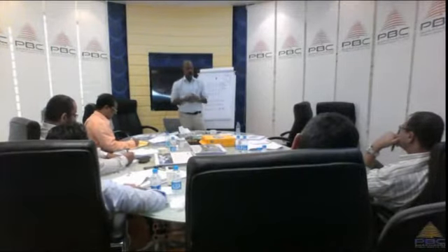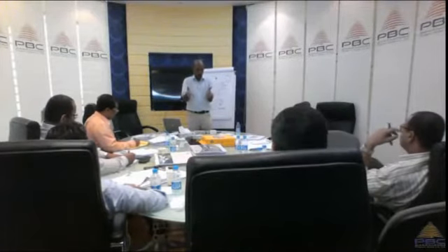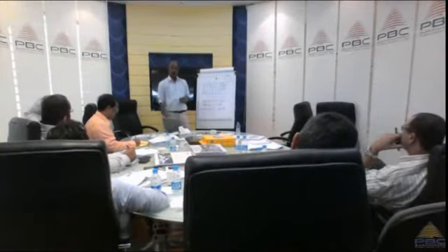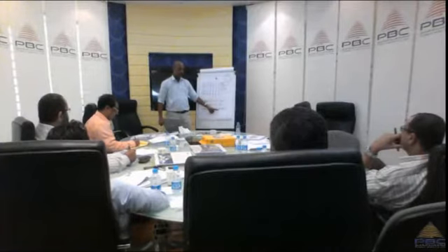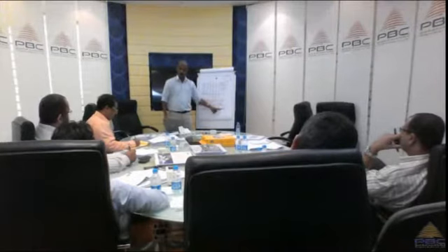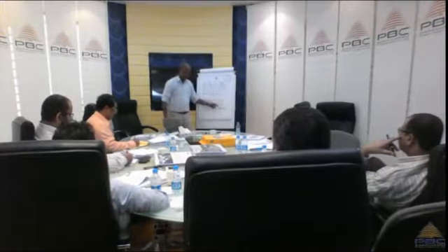So the total value of this work created is $2, according to our original definition. This is our contract. So we say the earned value is $2. Now here, straight away you can see something very important when you compare the earned value to your actual cost. So here we are over budget by 45 cents. We're overspending, because we're spending more than the value of what we're creating.